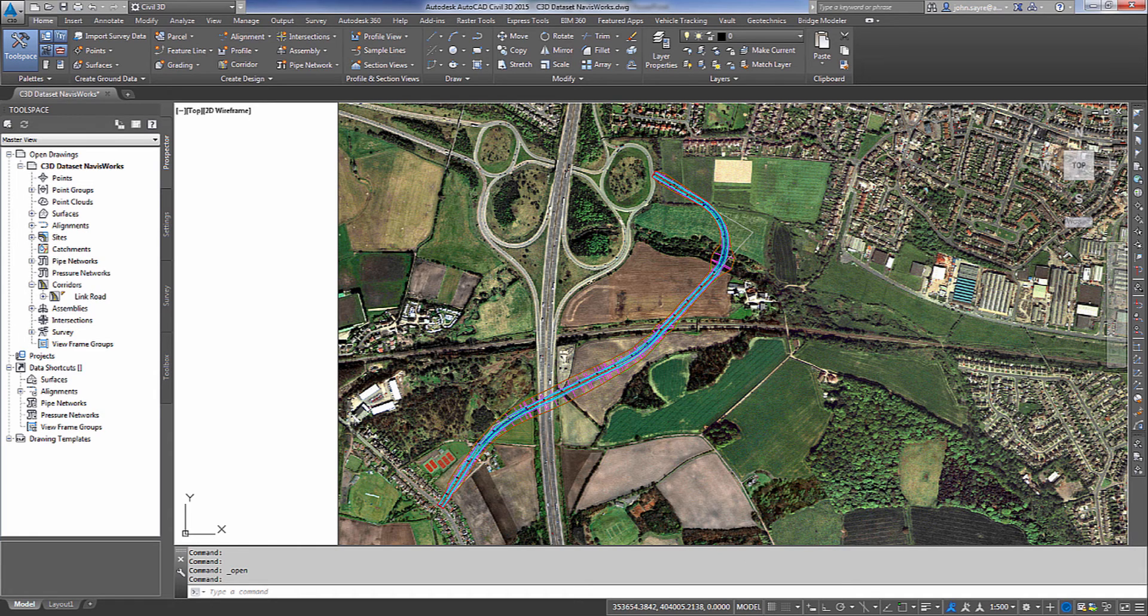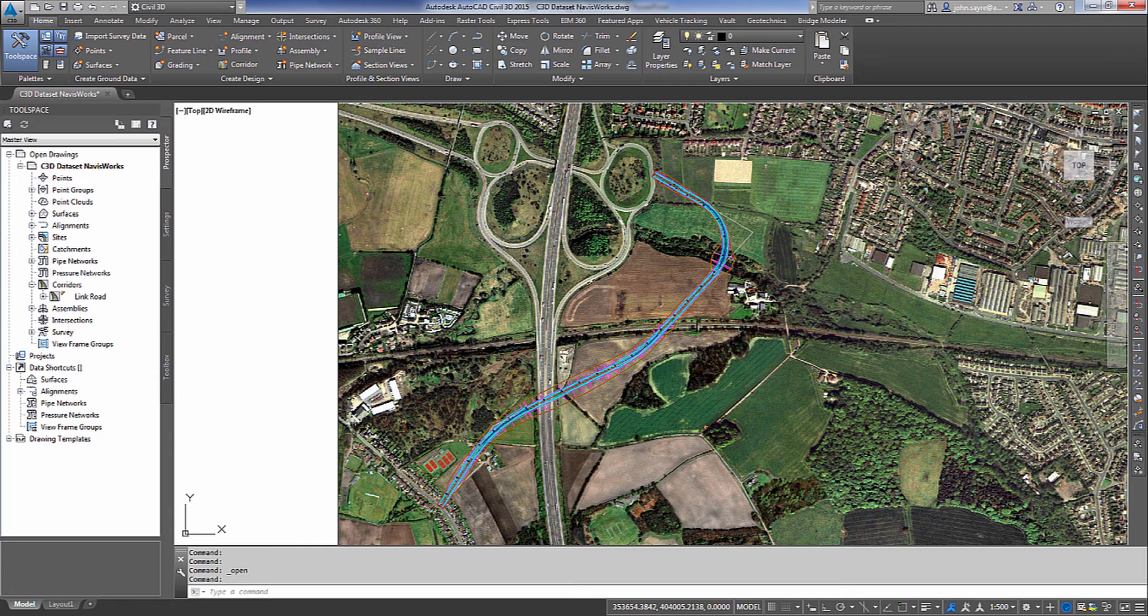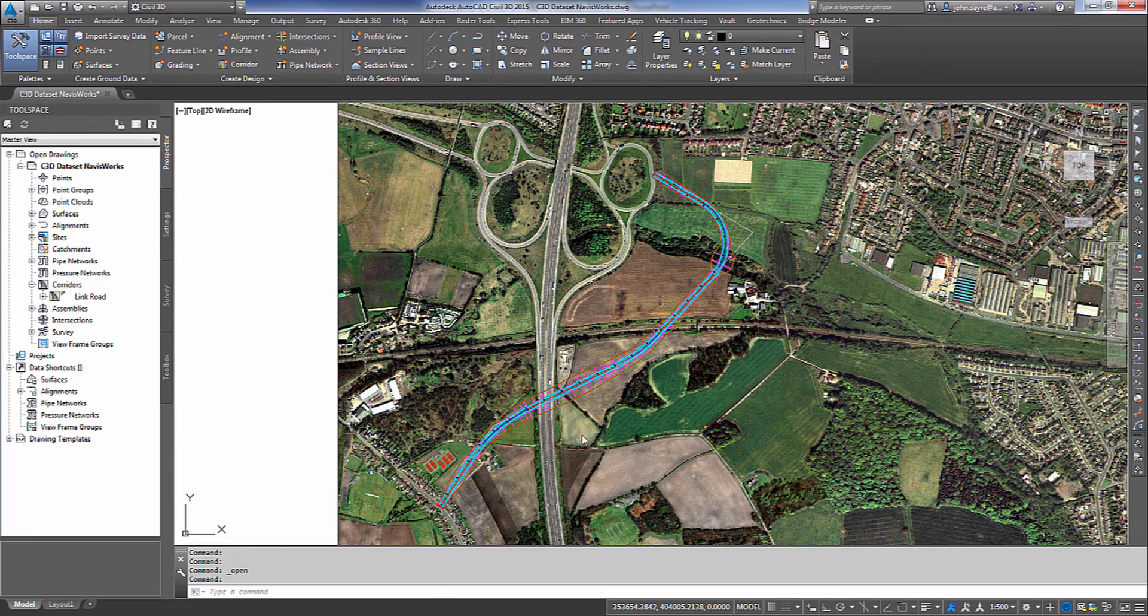So the design corridor is shown here in our Civil 3D model. We need to make sure that the corridor is broken down distance-wise the way that we want, meaning the contractor will not build the road all at one time. Today we will break it down into around 300 meter increments and once this has been reviewed, we can export the corridor solids. So let's take a look at our corridor.